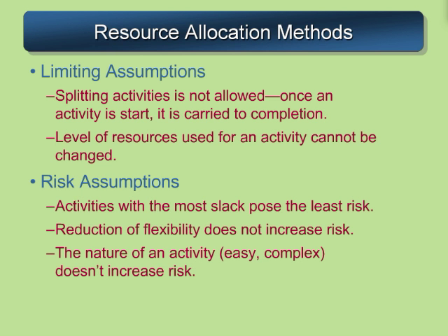Again, that holds a line on what it takes to get that project done under normal conditions, what it takes to get a specific activity done under those same conditions. If we're starting to add more resources to speed up that activity, well, that's a strategy, but it's a strategy we use in a process called crashing, which you'll see in the next chapter.